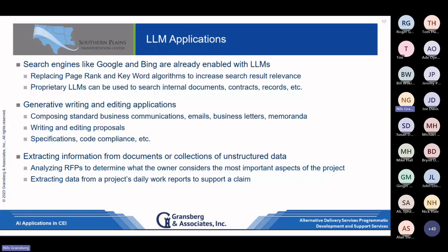I'm doing DOT work, I've got daily work reports I have to put in, or my contractor does. I've got inspections, site visit reports. I've got all this data that's generated there. Same thing with invoices and pay applications: here's how many yards of this that we did this month. I can extract that data to look at it and say, okay, did we actually have a delay here or not? Do we actually have a claim? Was there any change or not? How much actually was here?